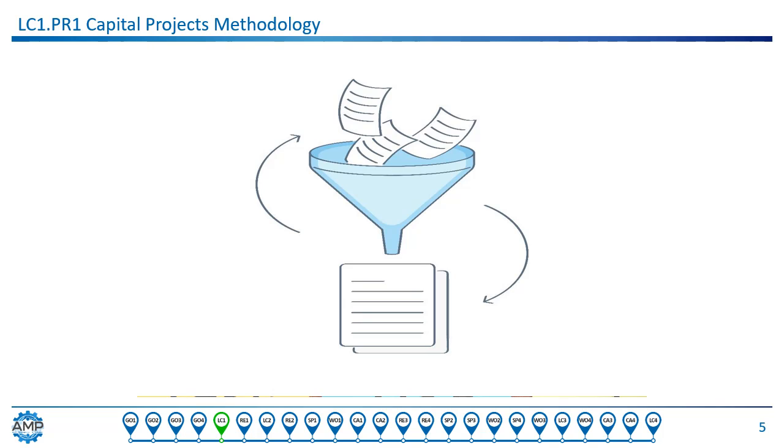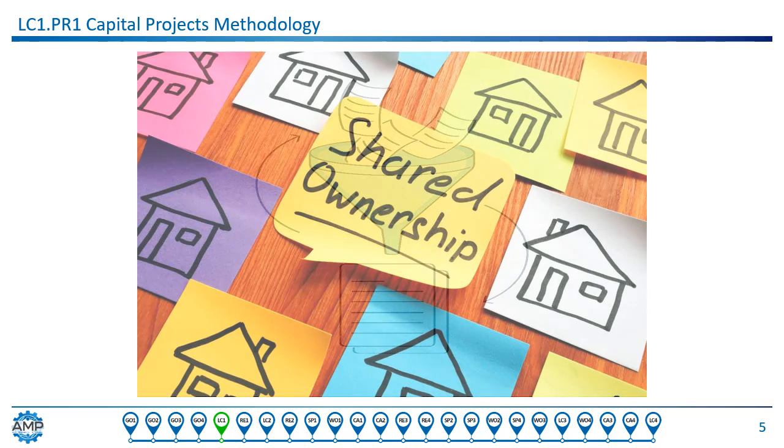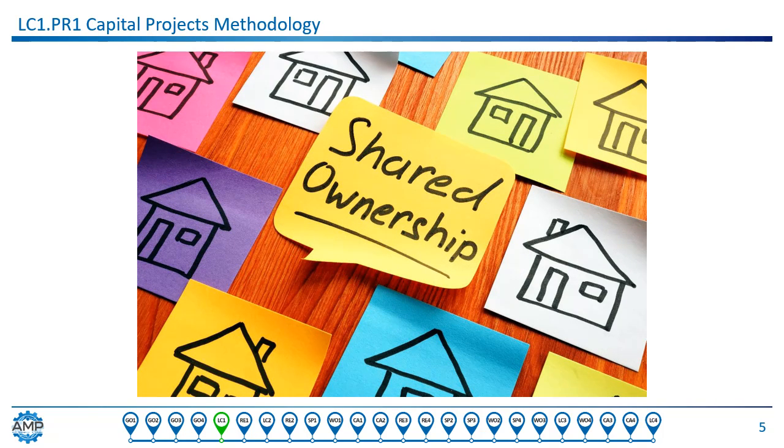It is very important for acquisition projects to implement processes that ensure asset information is available and formatted for use in the asset management processes. Desired functionality should be documented in a user requirement specification called a URS, and asset technical specifications aligned to support desired functions in the functional requirement specification, or FRS. All key stakeholders should be solicited to provide input regarding desired functionality via the URS and FRS documents.